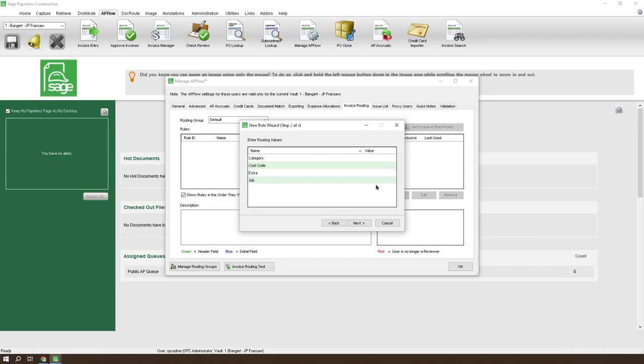And then we'll go ahead and set our rule here. You do get to give values for multiple things when you set it up. So, you've got a particular job, but because it's at the line level with a job, you can also get as detailed as the cost code or even the category for the cost code. So if you have the parts manager who needs to know that they need things for materials, and the warehouse manager needs to know that they need things for materials, and the PM needs to know things for everything, you might create multiple rules, or you might have both of them within this one rule.